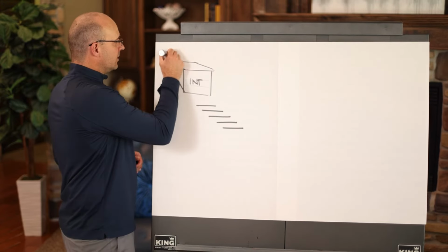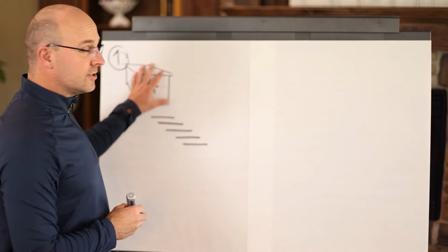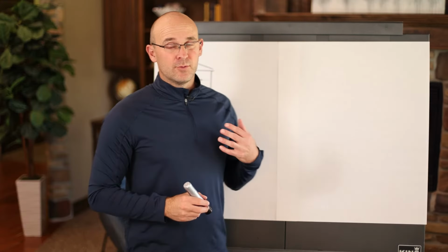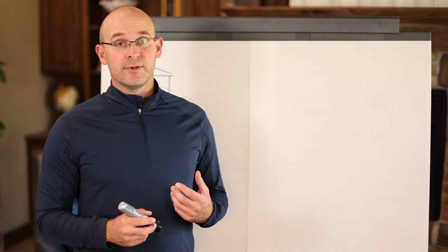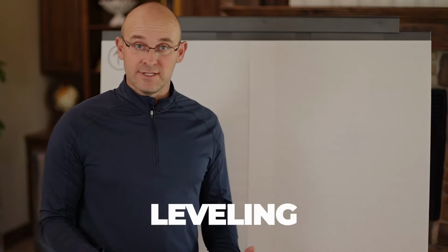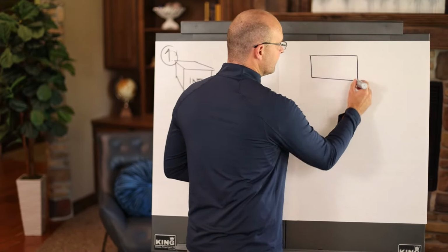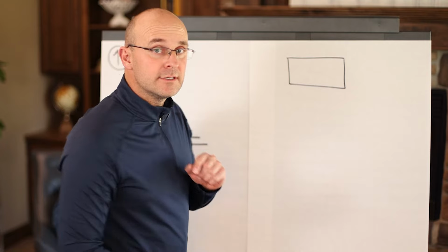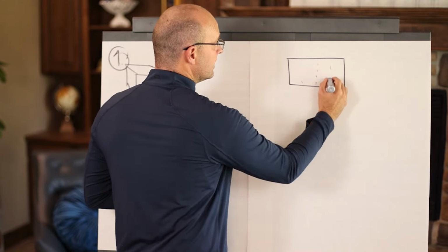So that's number one. Number two, the main thing I want you to remember as you start to experiment with these formats and you really get a good view of what takt planning is, is this concept of leveling. So if you have a 40,000 square foot floor, you will not break it up in even zones by square foot.